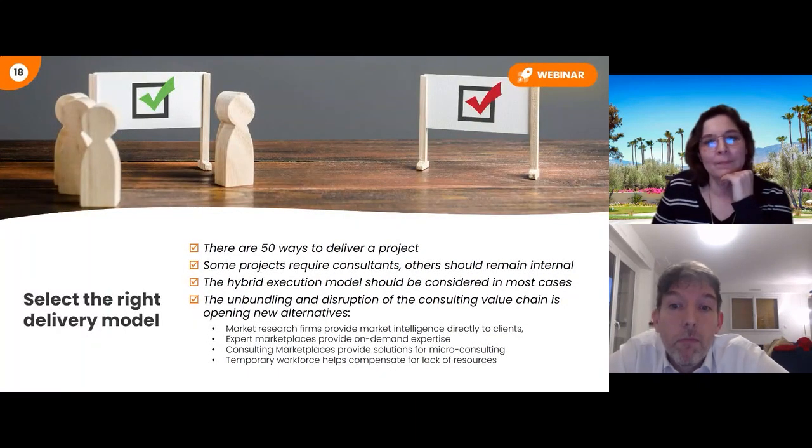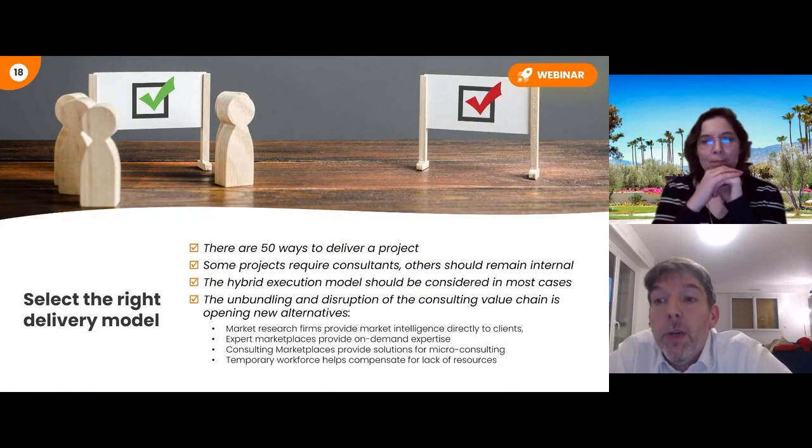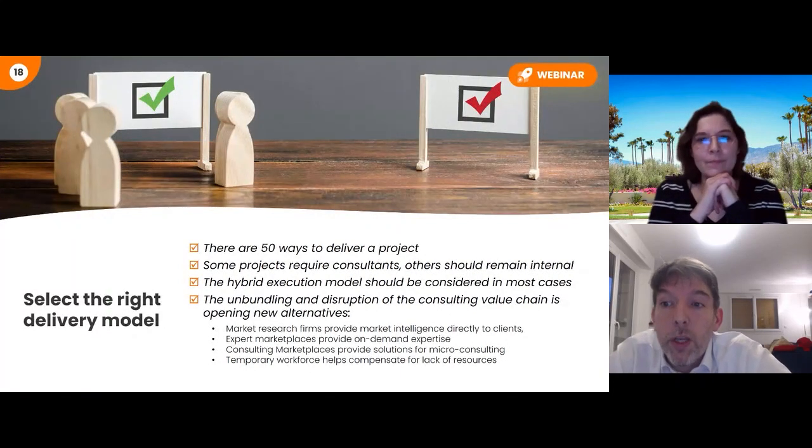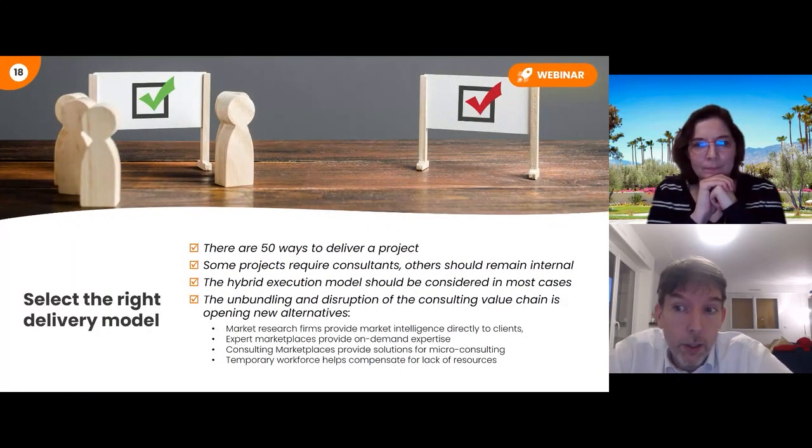Some could or should be done internally because they are too confidential and you want to keep that close to the vest. Sometimes just pushing to have some internal resources in the project will at the same time grow your teams because they will work with the consultant, but also reduce your bills because this way you don't pay for the juniors at $3,000 a day.